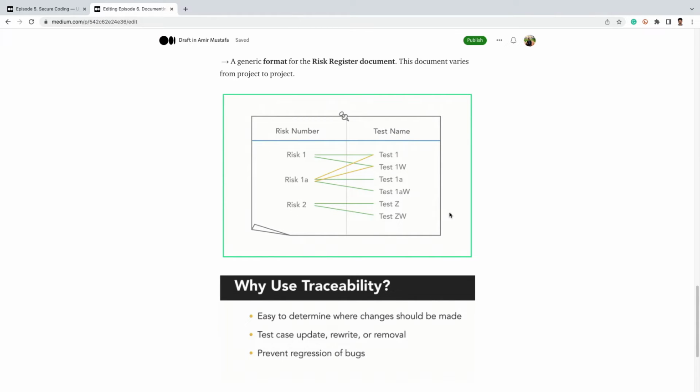So creating a risk register means listing the package name and dependencies. The test name we can write in any way. Test name means, suppose there are 5 modules: in module 1 it is used, in module 2 it is used. So a one-to-many relationship is used: the package is used at how many places. That's a risk register. We can frame it in any way. We can write a risk number. Risk 1 is, let's say Cloudinary is a safe image platform, but suppose we are using it and they say no, you have to upgrade to this version. So risk number 1 is Cloudinary, risk number 2 is any package 2.